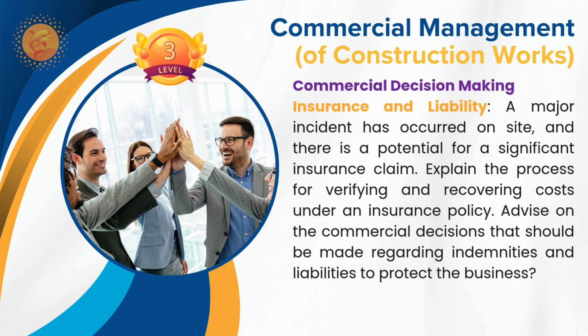Then, parallelly, I started evaluating the losses in my project, such as the permanent work and the extent of damage, as per the insurance policy conditions and sections. According to the sections, I started the evaluation and prepared the preliminary estimate.